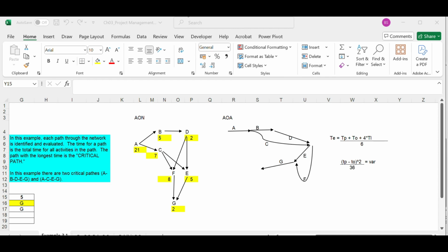This is where we need a WBS. This is a detailed planning approach. Some of the methods that are used for this bottom up approach are the parametric method or a work breakdown structure, etc. Top down approach is used for the preparation of a budget. Usually the preparation cost is low for a top down approach. Top down approach is used for a macro planning phase.